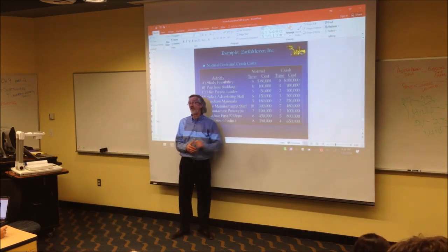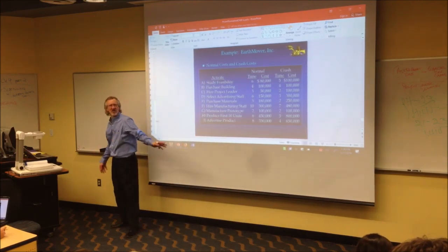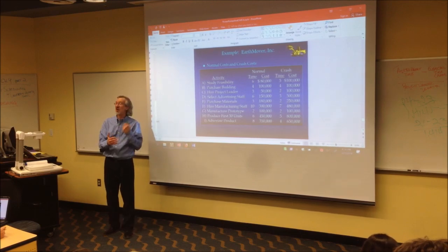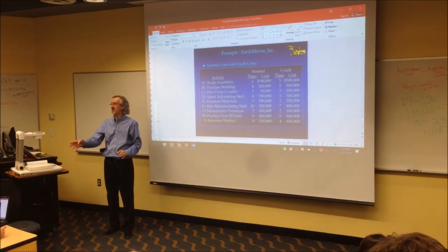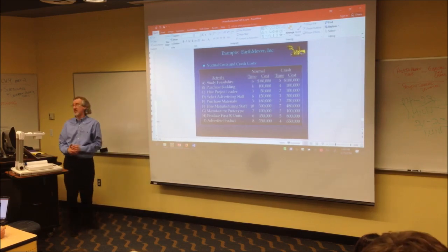And then, all of a sudden, you come up with the expected time, you have your variance, your project standard deviation, the probabilities, and someone says, we need this to be done sooner. Money doesn't matter, we just need it done before that expected time. And so that's called crashing a project. And it always costs money.